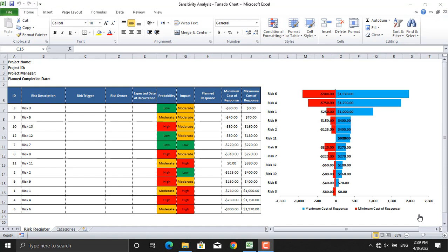This diagram is useful for sensitivity analysis, comparing the relative importance of variables. For example, if you need to visually compare a hundred budgetary items and identify the largest ten items, it would be nearly impossible to do using a standard bar graph. However, in a tornado chart of the budget items, the top ten bars would represent the top ten largest items.